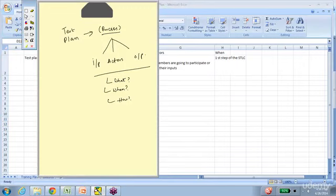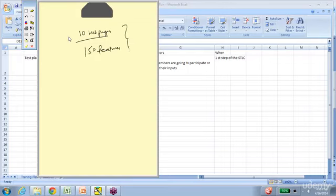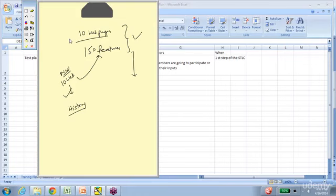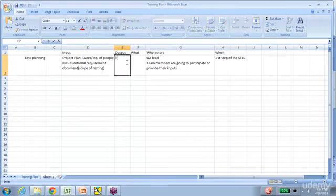In addition to the project plan, we refer to the FRD — Functional Requirement Document — to understand the scope of testing. We need to know the size and complexity of the application — say it runs 10 web pages and has 150 features. You need to do some analysis to figure out how much time it's going to take to test. If you have history from testing a previous similar application, that experience combined with understanding of the current situation helps you plan better in the test planning phase.